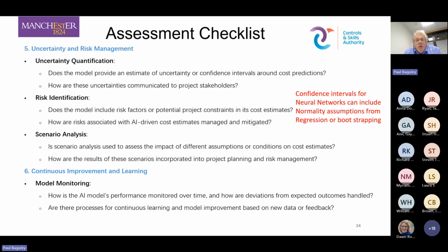And you basically use the same assumptions as you do in parametrics, these assumptions of normality, and you are able to develop these confidence intervals like that. Or there's a resampling method where you could use bootstrapping to do that. So one improvement which people should make, I think, is to start to routinely develop confidence intervals for visualization.